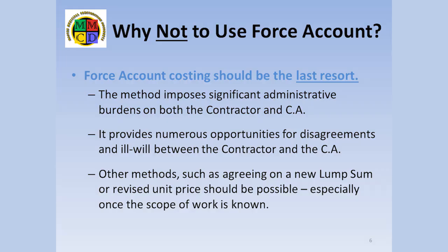Furthermore, and possibly most significant, there are so many points on which the two parties may have different opinions that disagreements are likely, and this leads to a breakdown of the cooperative attitude which we hope to promote at the field level. For example, how much overtime should apply to the force account work when it took less than the person's full shift? Or was every piece of equipment needed and in use, as opposed to some of it being on standby for part of the shift?